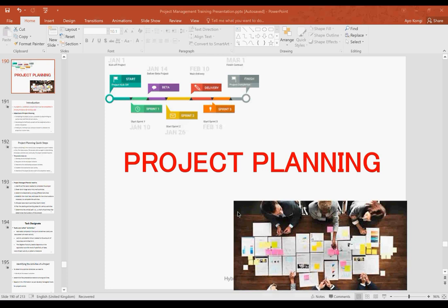I just don't want to look at your plan and see activities without people attached to them. I also don't want to see a plan, like Francis said earlier about dependency and critical path, without a predecessor and a successor. So it is inside the schedule management strategy that all of these will be documented. Does that make any sense? So that's what you see inside your schedule management strategy. It's just a strategy on how to manage your plan.